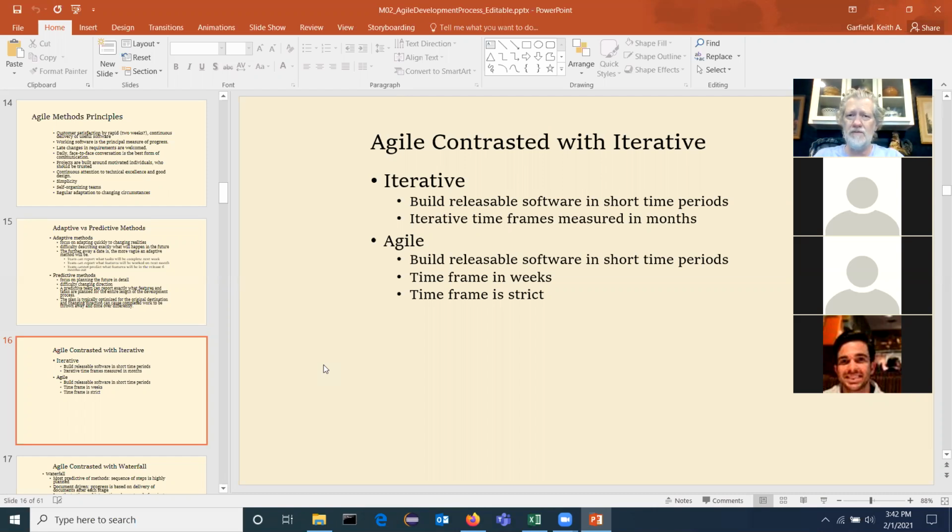Remember in the first thing I said, oh gosh, most software is like 180% of planned schedule. So it's supposed to be done in 10 months, it was done in 18 months. Oh, and it was supposed to be $100,000 and it was $180,000. Agile actually gets rid of that. And it does it this way.